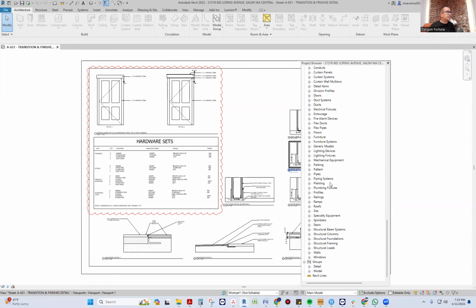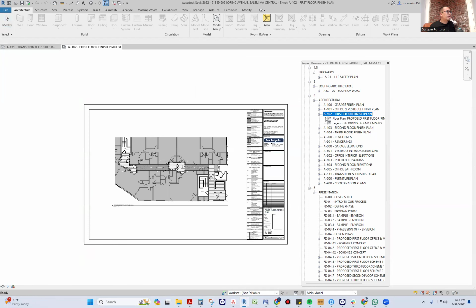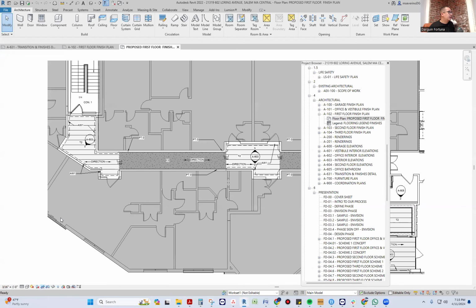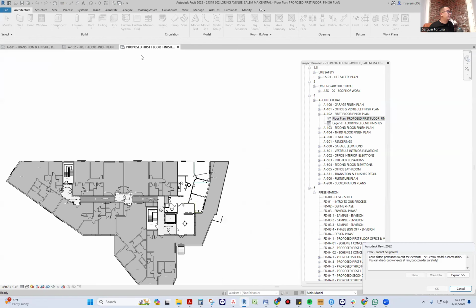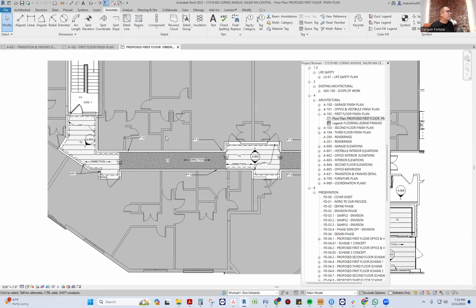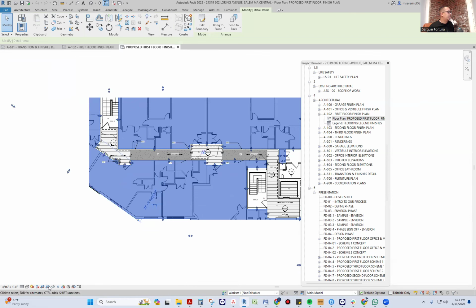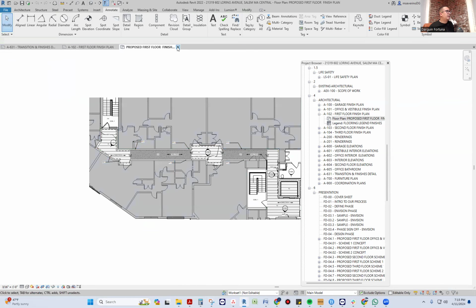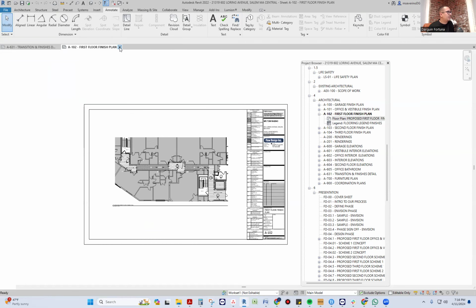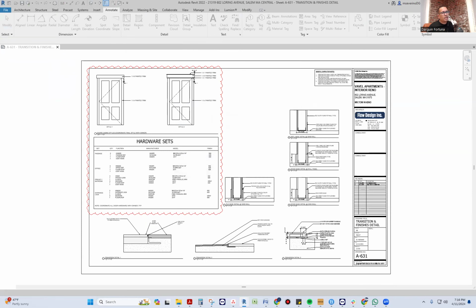But in this case, look, I'm actually just going to go and find a floor plan. I'm going to do exactly what I basically showed you. I'm going to just get an area for the whole building, multiply it times the number of stories that it has, and multiply that times 350, 400, and then you're going to get your area. Okay. I'm having problems with this permit item. So yeah, I'm having a lot of problems with it. There were a lot of things I don't want to explain right now. But you can get the total area and then the total cost, and that will help you a lot. Okay. So that's all.